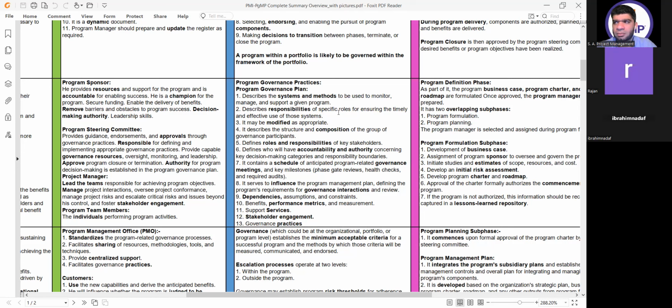So when the question says recommendation, as a program manager, I am making changes to the schedule, altering the cost, making changes to the budget. So you just make a recommendation here, then the governance committee will look at whether it is valid and then approve it. That means the approval will come from the program steering committee, but the documentation, procedures, working, and making a feasibility report have to come from the program manager.